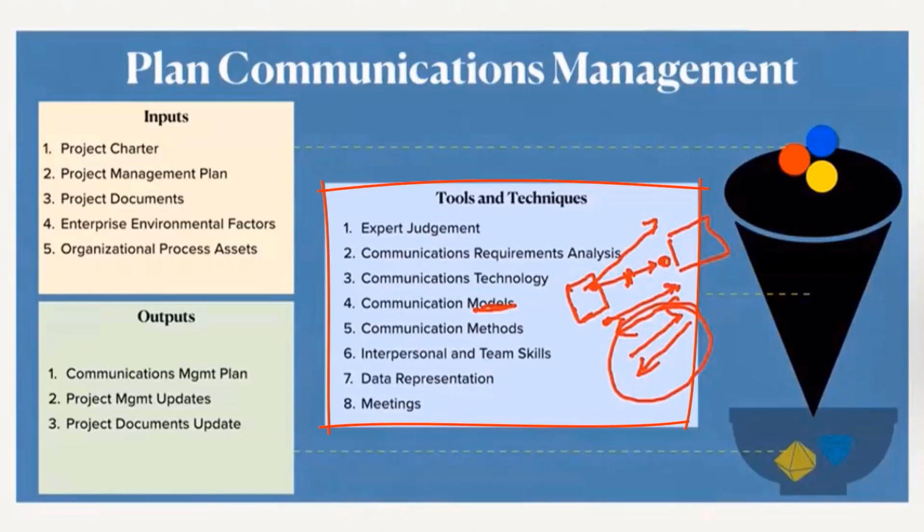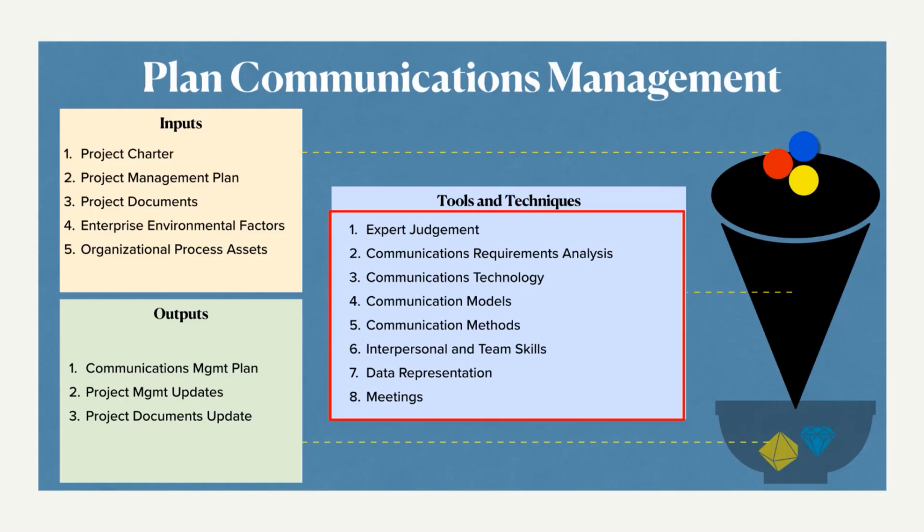So these are the two major communication models that we have to learn. The communication methods, this is typically talking about the stakeholders that are using the communication channels. Like, are they pushing the information or are they pulling it? Again, if we talk about the company brochures, the newsletters, the information about all the upcoming trainings, these are considered to be pushing method of communication. There is no pull here. From the sender to receiver, there is just push method of communication.